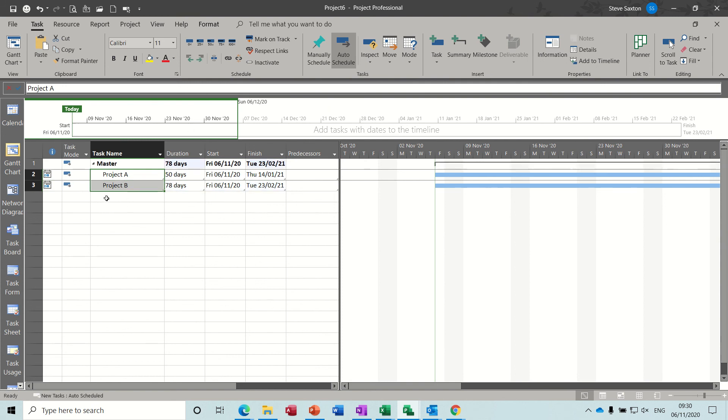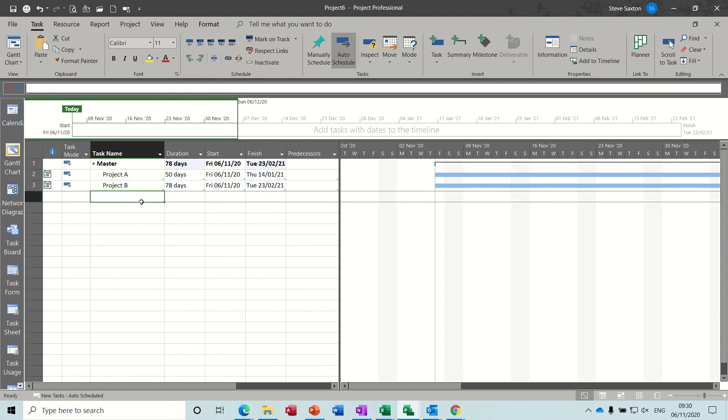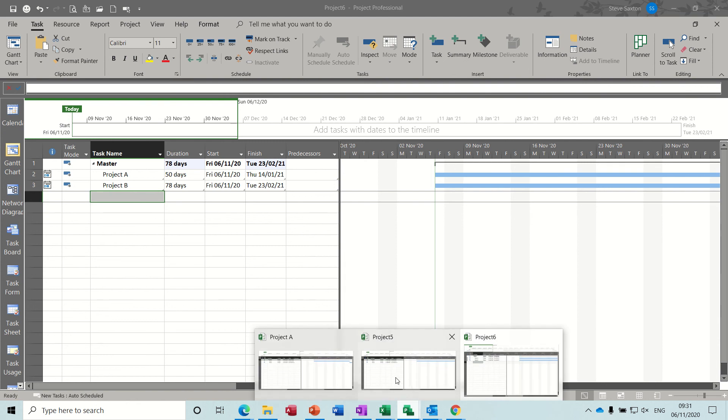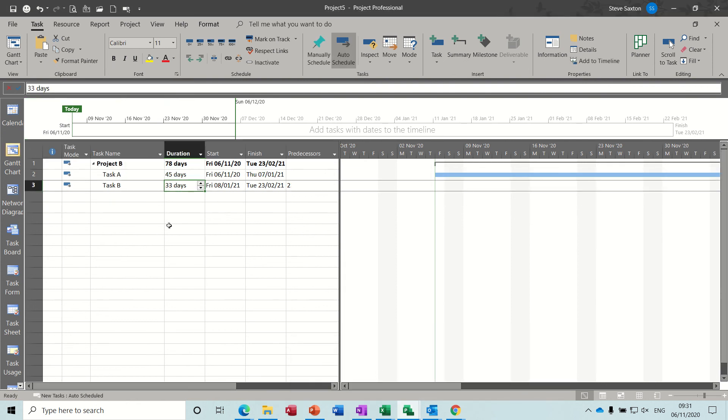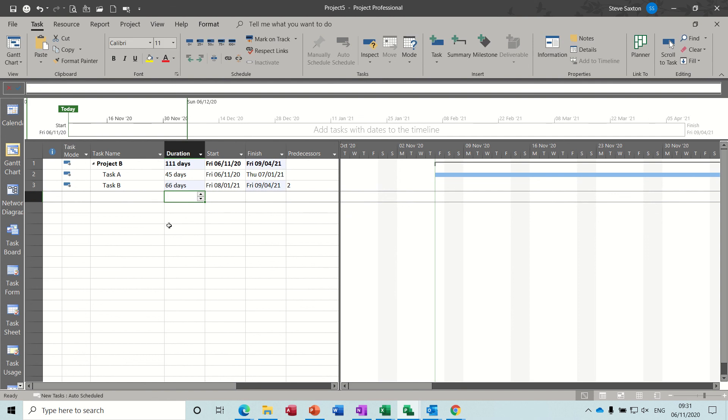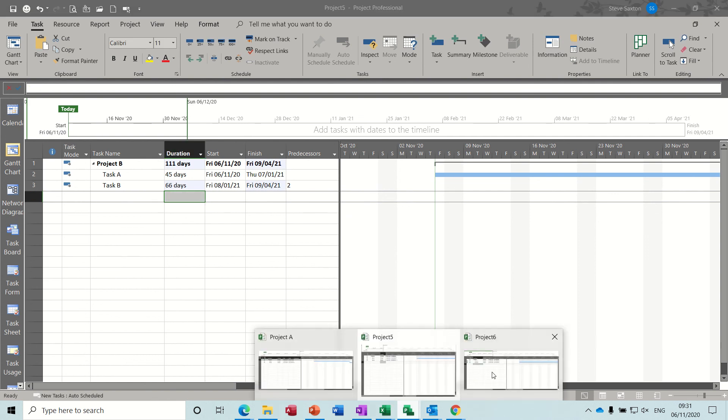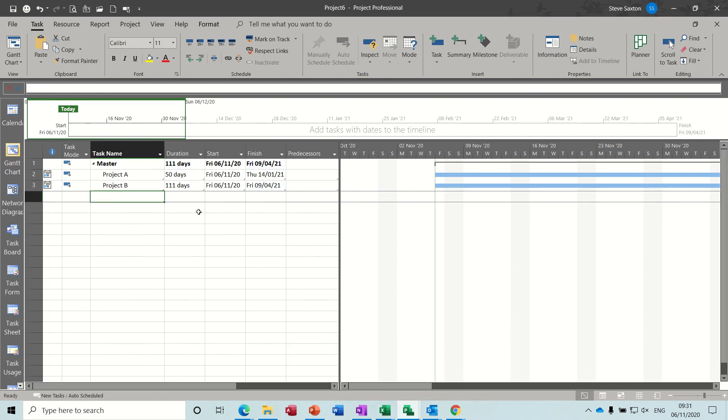It gives you a timeline at the top. 78 days. And if I go back into any of these projects. So I'm going to project B. And change that to 66 days. So that's gone to 111. Come back to my master project. And that's picked that up.